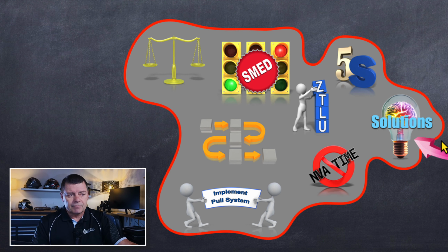The first one is where we begin the process of identifying all the scoping details associated with the project charter for this particular project. And then the second formal meeting is around building that operating agreement and getting agreement to the plan and the people you need and the timeframes you need them. Then the other part of it from a meeting perspective is 2 formal project meetings for the project team. In my experience, these have been 4-hour meetings.